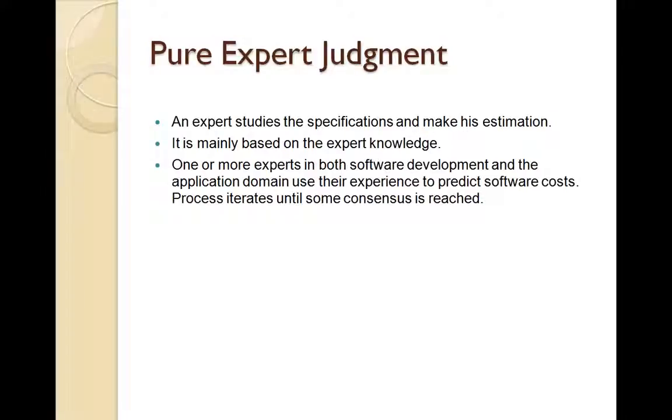So the first one is pure expert judgment. In this case, a person who might be a technical lead or a project manager or a subject matter expert would go through the requirements, try to understand them, and come up with his guesstimate. So the person will say, okay, I have worked on this particular login module earlier, and based on my experience, the same login module developed for this project will take 1 month. So this is based on the feedback of the expert.